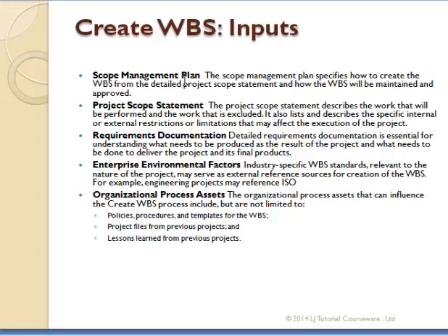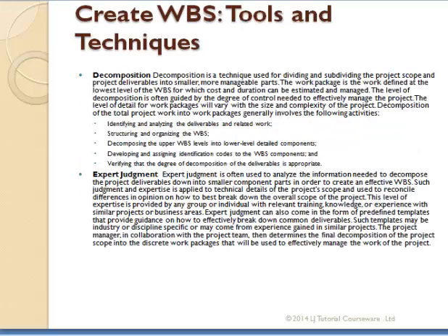Remember, our OPA is just a data bank. Then what are the tools and techniques used to achieve this? Now we can use decomposition. If you say the first step is digging, what does digging entail? Remember, we're trying to build a duplex and we say digging. When we want to decompose it, we can identify sub-tasks under digging.